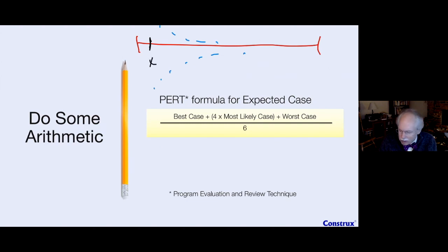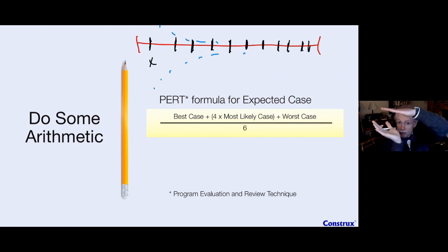But we can't just sit there. As we go through the project, we'll have to re-estimate on a regular basis. And this is part of the deal of having a planning number, because we're going to say, well, I hope to never update my promise. Because remember, my promise was a huge multiplier, and I should hopefully be coming in on that.